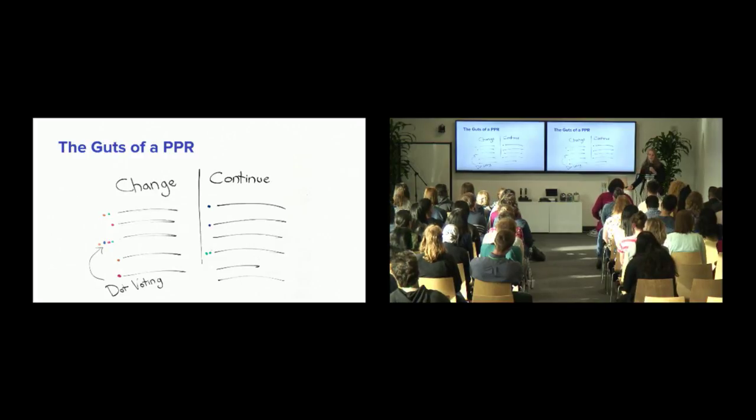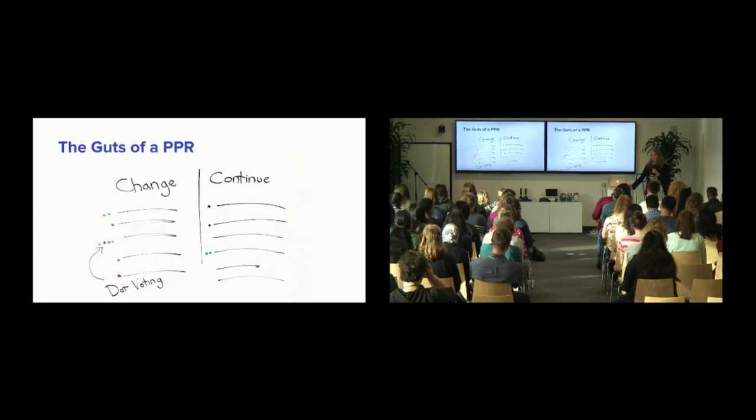Typically you just decide how many votes each person gets, and you can vote from either the changes or continues. And so as the session ends, you as a group have decided these are the top 3 to 5 biggest things that we would change or continue moving forward.